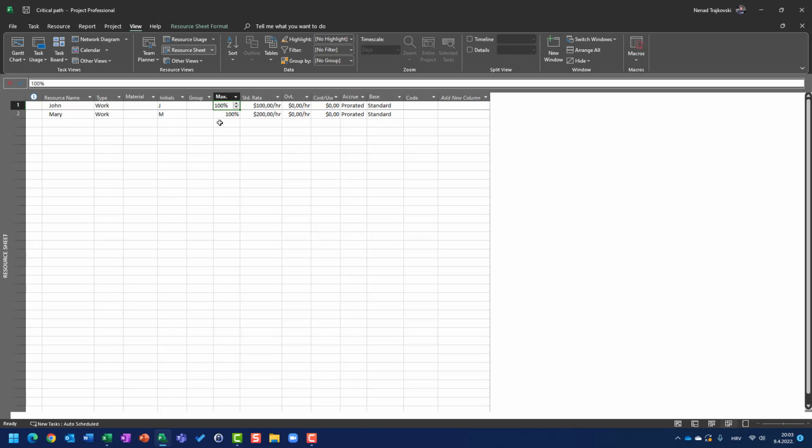of his availability per day on a project. It means that if John is available 8 hours per day, what is the common situation? 100% means that on the project he is supposed to work 8 hours per day, even 8 hours on Monday, for example, at task A, or 4 hours on task A and 4 hours on task B.